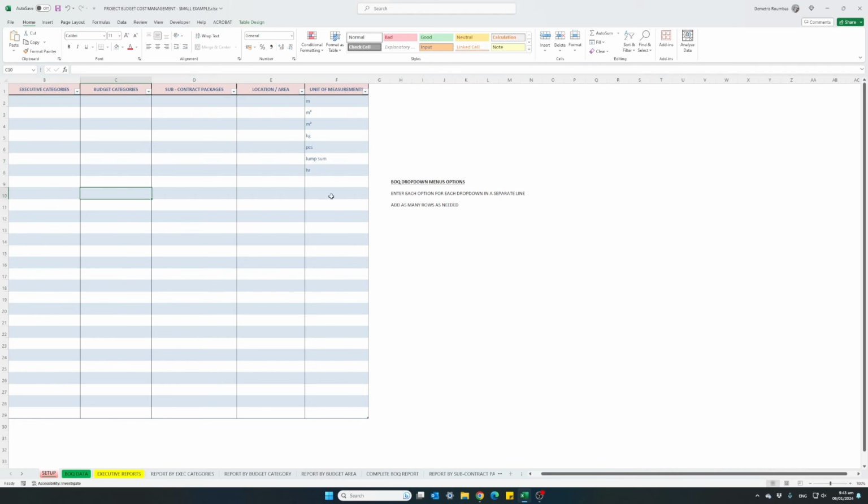We can also, as the work progresses, variations might appear. Let's say for this line we had a bigger quantity, and instead of 120 square meters it was actually 135 square meters at the set price. Now this extra work variation, 1,350, will now be added to our contract, and we will get a cost projection of 6,000.